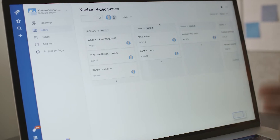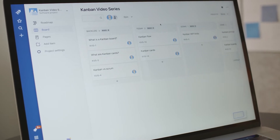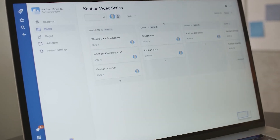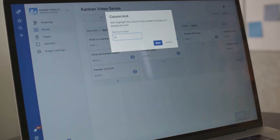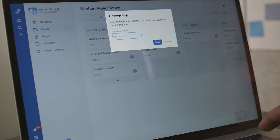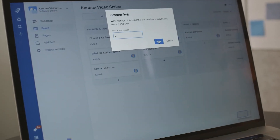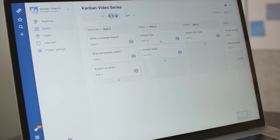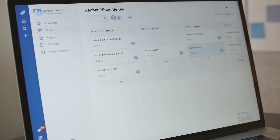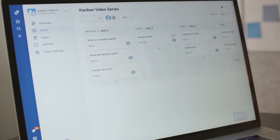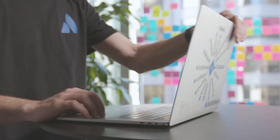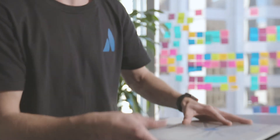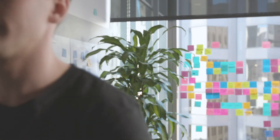On digital boards, it's even easier. I have Jira Software Cloud in front of me and I can add WIP limits directly to the board. Let's set a WIP limit of two for 'doing,' which I can reach with one additional card, and I will break at three.